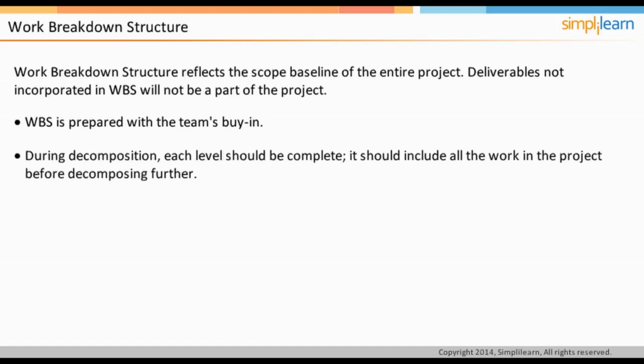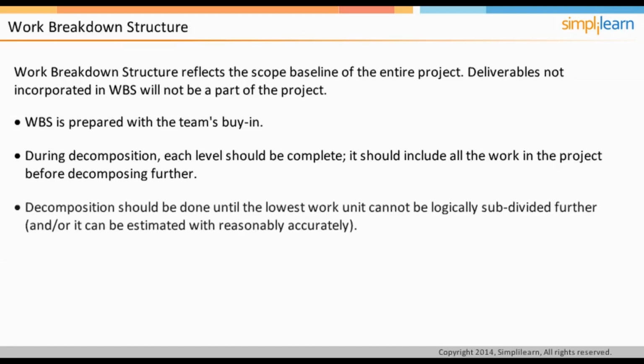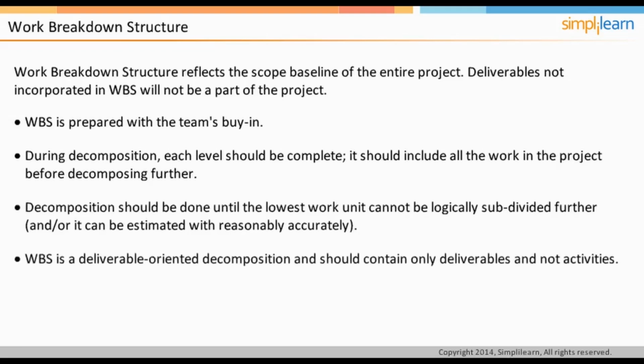During decomposing the deliverables, you must ensure that each level is complete. That is, it includes all the work in the project before you start to decompose further. Decomposition continues until the lowest level deliverable cannot be logically subdivided further, or they can be estimated with reasonable accuracy. WBS is a deliverable-oriented decomposition. It should only contain deliverables and not activities.